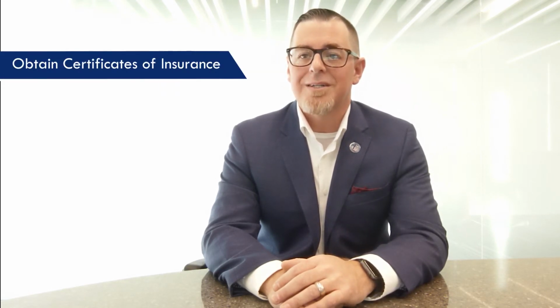Do they have a good reputation? Do they have references you can contact? Obtain certificates of insurance and ask to be named as an additional insured on their policy to make sure there is a clean differentiation on whose policy is responsible if a claim happens. Do they have liability insurance that covers any property damage or bodily injury that might happen on the job? If not, your business could be held liable for the work they do and any claims that could arise.